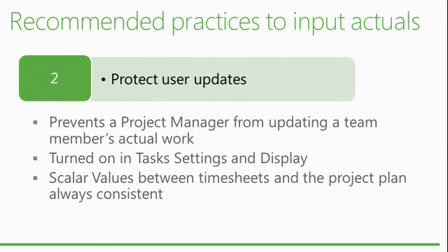So if you enter a week, what Project Server is going to do is look at, because it stores the data not by week, but in buckets, the amount of time, basically, by day, typically, but it goes even further in the reporting database, where it's by 10 minutes of units. So the way it stores the data doesn't matter.